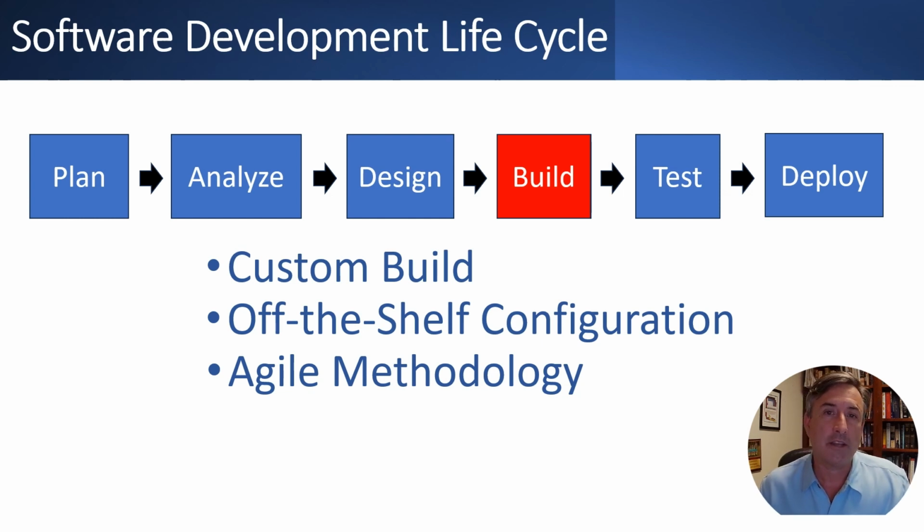So also, as a manager, if you're doing agile, you should expect to see progress from your development team daily. They should be closing user stories daily. I've had projects where we've closed close to 60 user stories in a day when we're really humming along. Other days you may only get 2 or 3.